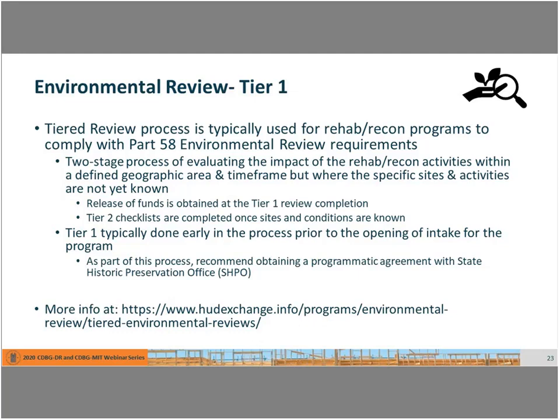look at the general conditions in the geographic area in which the program is going to be undertaken. And that's a subject of a whole other conversation, but in some cases that could be as large as, say, a county or a multi-county region, depending on the situation and the conditions. And what you do is look at your environmental checklist and complete the checklist and go through compliance and correspondence with all the different relevant agencies for the general conditions in the whole geographic area.